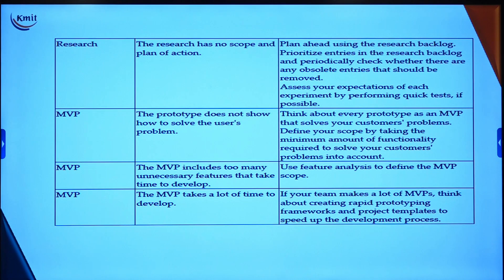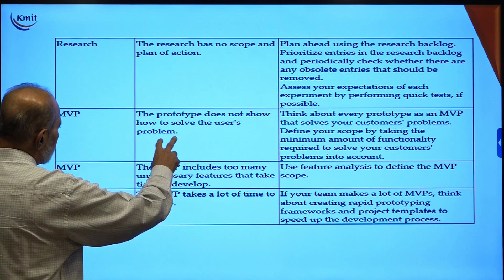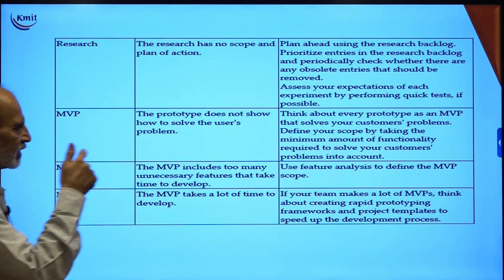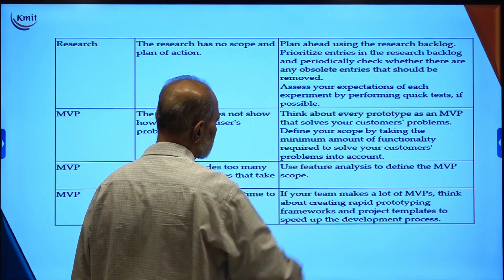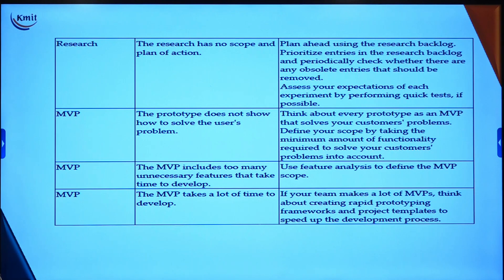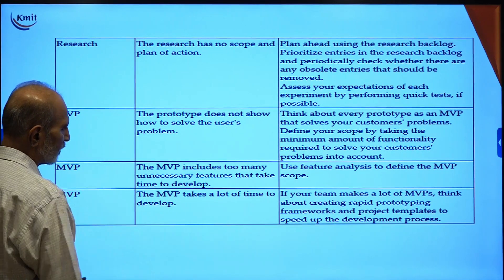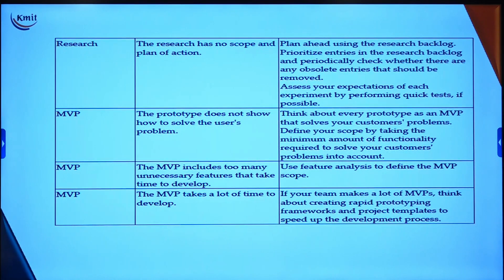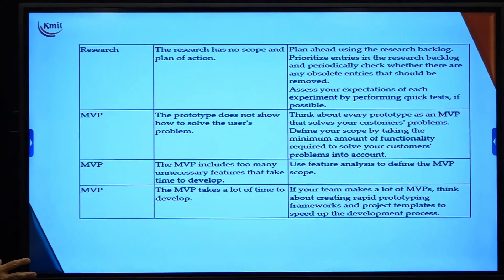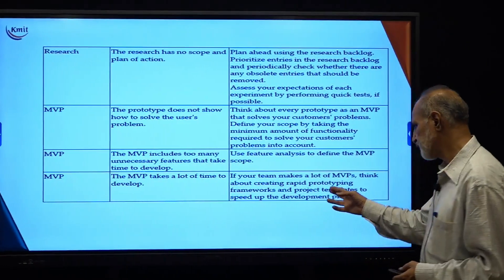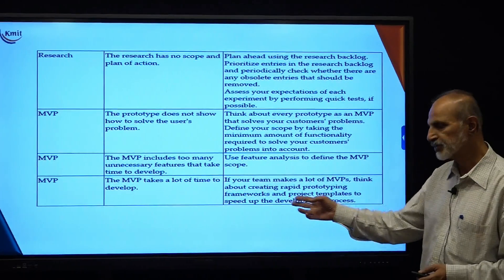The third category is MVP. If the prototype does not show how to solve a user problem, think about every prototype as an MVP that solves your customer's problem, and define your scope by taking the minimum functionality required to solve the customer's problem. If the MVP includes too many unnecessary features, use feature analysis to define the MVP scope. If the MVP takes too long to develop, think about creating a rapid prototype framework and project template to speed up the development process.